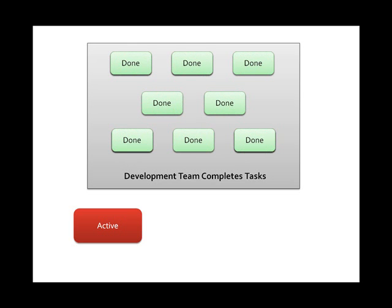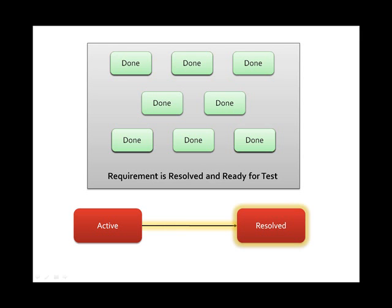Eventually, the development team will have completed all of the tasks that make up that requirement. At that point, the requirement can be moved to resolved as it's ready for test.